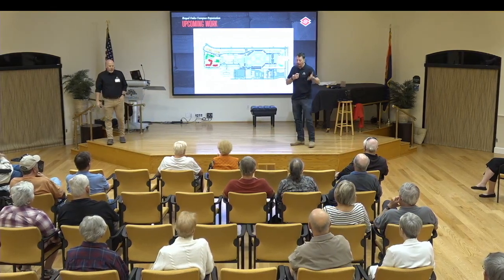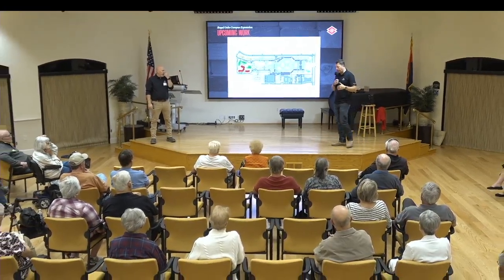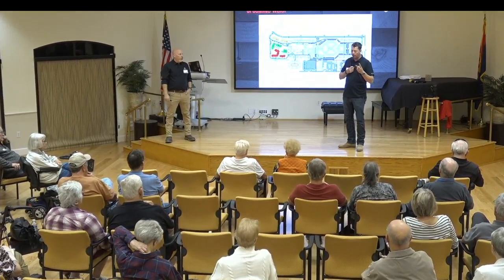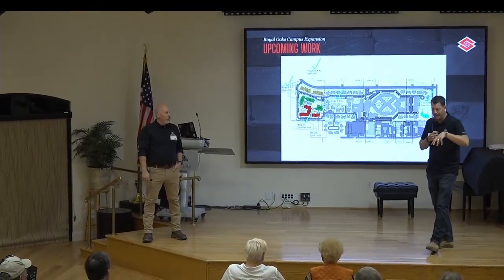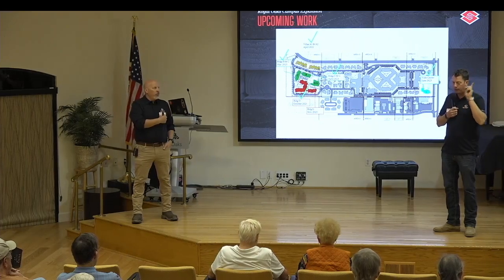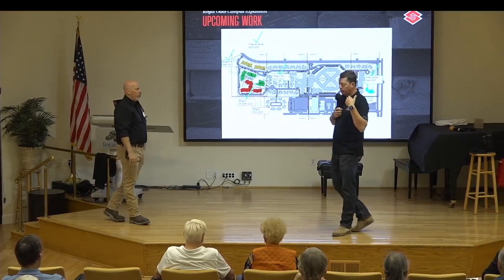Behind the scenes, we do a lot of things that we don't tell everybody in these meetings. We go through and we put the fire alarm system in test. One of the things we do after that is we get a fire watch. That person walks the entire building that we've asked to put on test. For example, lately we've been putting building D in test. So we have a person that walks every floor every 15 minutes. They don't go into the units, they just walk the corridors and the common spaces, they check those.